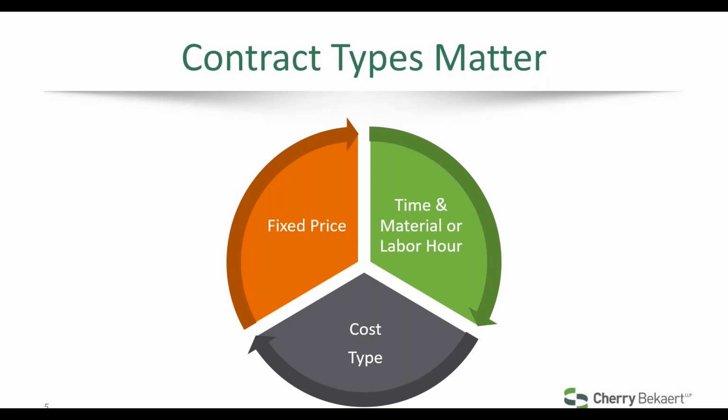However, the real question is the total costs. And if the contract award is not competitive, then the question on contract type becomes more of an emphasis, and that's where indirect rates come in. Depending on the contract, fixed price is typically a lump sum. Time and materials is based off of an hourly amount. And then cost type is exactly what it sounds like for an award. It is based on your total composition of cost.